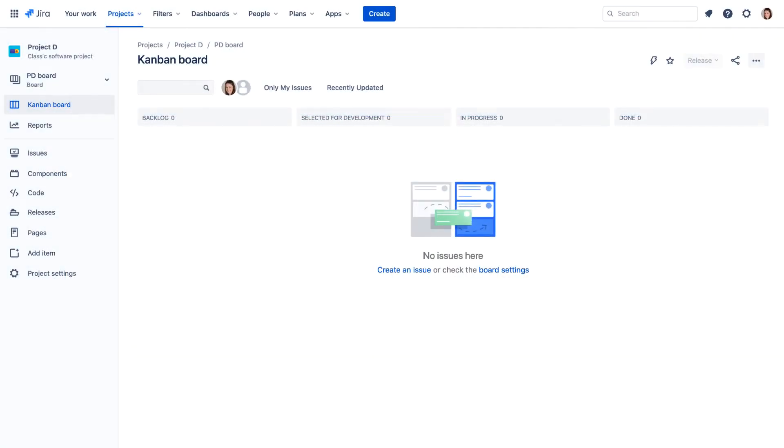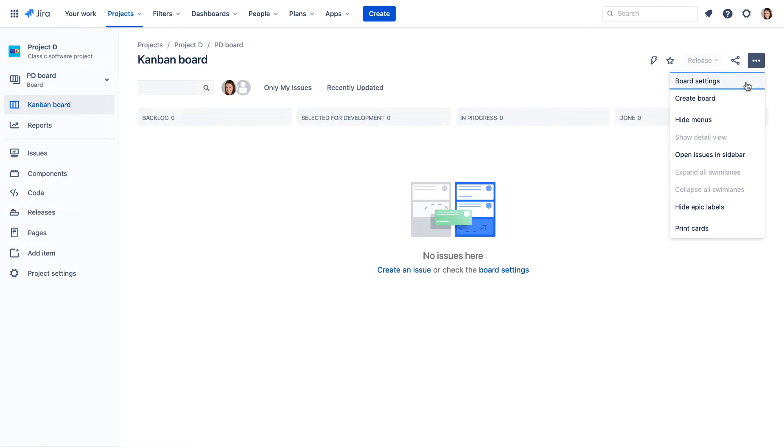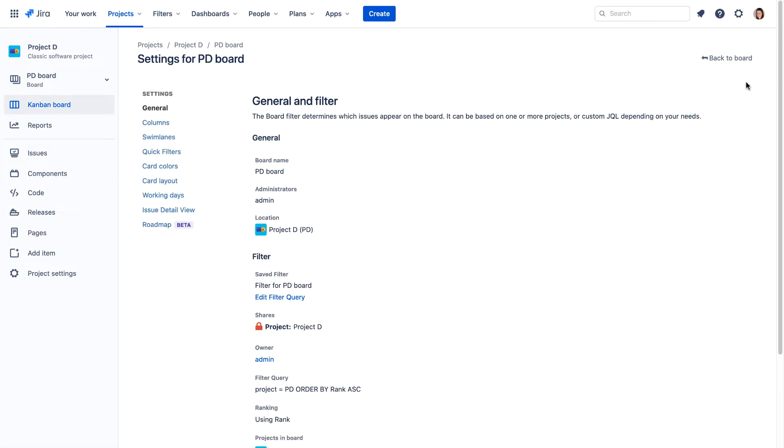To use roadmaps, a project or board administrator must enable roadmaps for a project. This is done from the board settings.